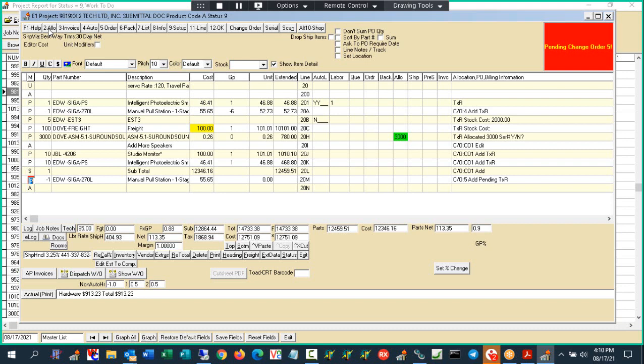There's absolute control of people not being allowed to just add items to the project, and this isn't always for the negative. There's a lot of times our salesmen get parts that come back. They don't have a clue the technician just brought 100 parts back. So we need to be able to also put the negatives on the job when we're receiving the parts and physically putting them on the shelf too. And their job should be credited for those parts.